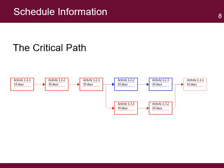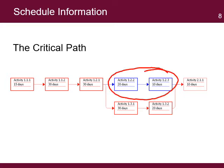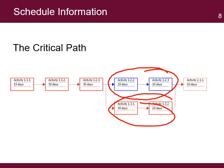Any delays in those activities will result in a delay for the project. Activities 1.2.2 and 1.2.3 have a slack of 20 days compared with activities 1.3.1 and 1.3.2. That means that those activities can be delayed for up to 20 days without delaying the project.